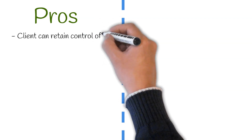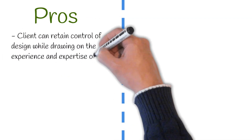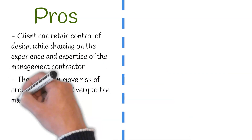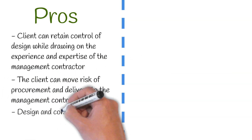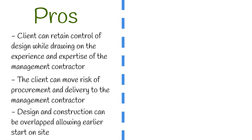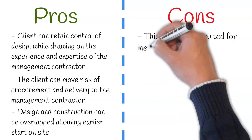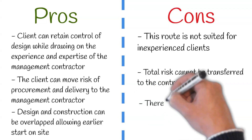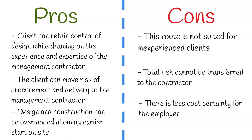Pros to this route include: the client can retain control of design while drawing on the experience and expertise of the management contractor. The client can move risk of procurement and delivery to the management contractor, and design and construction can be overlapped, allowing an earlier start time on site. Cons include: this method is not suited for inexperienced clients, total risk cannot be transferred to the contractor, and there is less cost certainty for the employer.